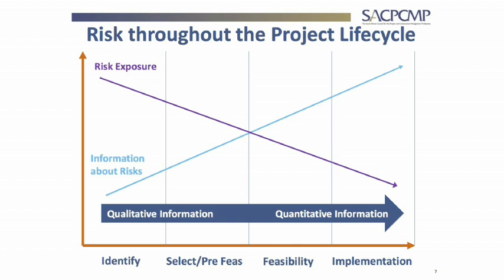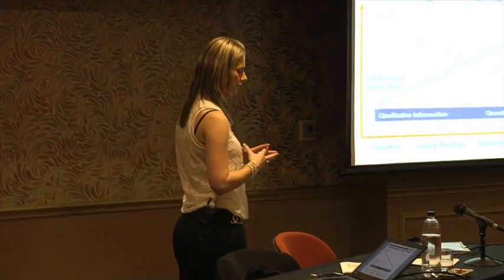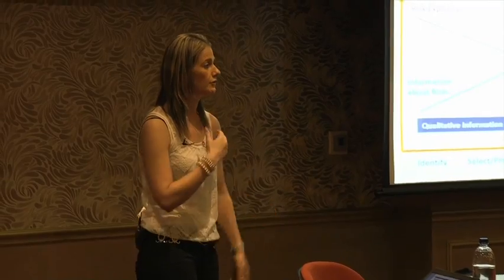Okay, so with little information, of course, your risk exposure is very high. The more the information becomes available to our disposal, the less the risk would be, in the sense that it's not to say that the risk impact won't be major on your project. It's just saying that the more info we have, the better we get at being able to assess the risks, to cost them, and to put any treatment or mitigations in place to try and either prevent them or reduce the impact.